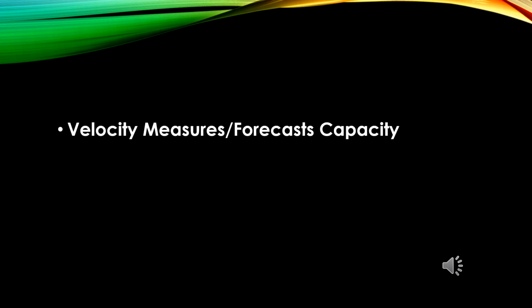However, it's a fallacy to assume that capacity should have an upward trend. Even though the cone of uncertainty narrows later in a project, the cost of technical debt and refactoring generally increases, and these factors consume team capacity as well. In addition, it is not uncommon for the complexity of user stories to increase over time as the low-hanging fruit is picked up from the product backlog items. Again, this added complexity will consume an equal amount of capacity from the team.